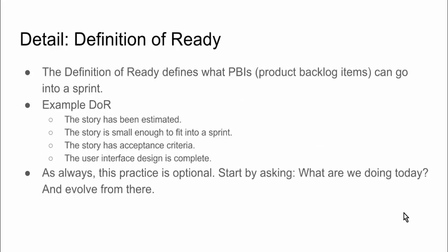The definition of ready is a great tool that you may want to implement. It's totally optional. It's the counterpart to the definition of done. The definition of done indicates when a PBI is done. The definition of ready indicates when a PBI is ready to be taken into a sprint.